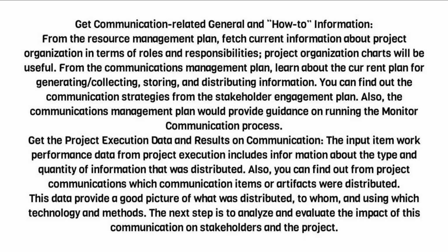Get communication-related general and how-to information. From the Resource Management Plan, fetch current information about project organization in terms of roles and responsibilities. Project organization charts will be useful. From the Communications Management Plan, learn about the current plan for generating/collecting, storing, and distributing information. You can find out the communication strategies from the Stakeholder Engagement Plan. Also, the Communications Management Plan would provide guidance on running the monitor communication process.